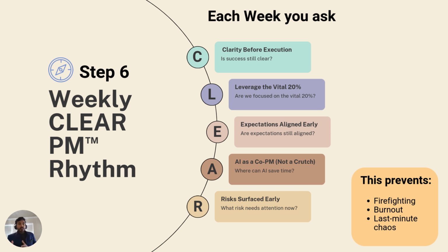I should focus on the scheduler widget she's looking for more, because she's using it day by day, daily. That can help me understand what my 20% is, because when I deliver it, people can start using it and then easily give us feedback. So this kind of question can help you identify that 20%.